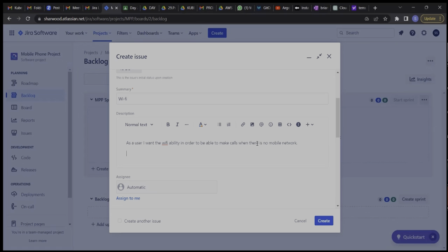After we write the description, as a who, I want what, so that why, we need to put in the acceptance criteria. Remember, acceptance criteria is what is going to guide the team to know how to build this, or what should be part of this particular functionality. So we'll go under here and abbreviate it with ACC, which is the acceptance criteria, and we can use bullet points.